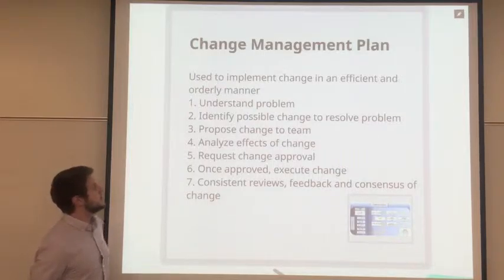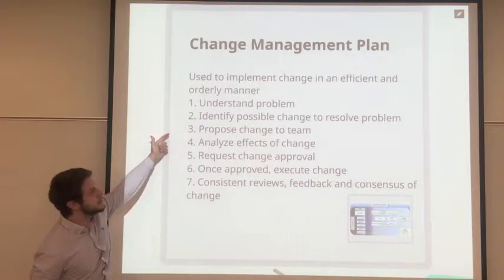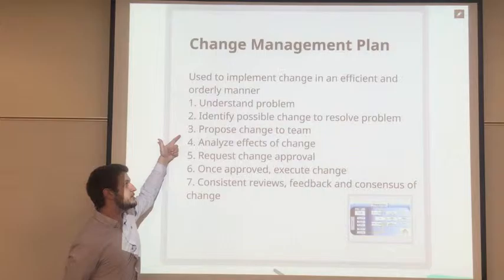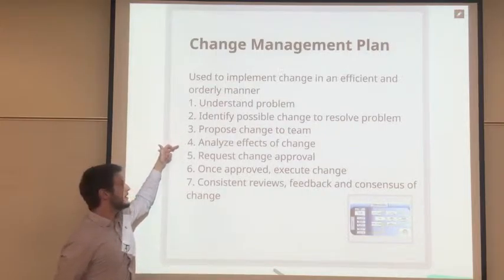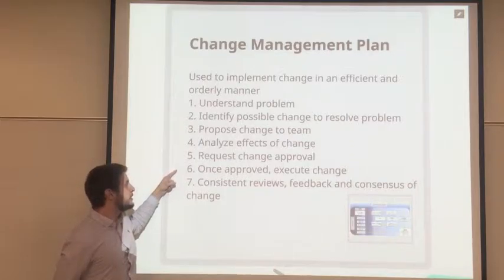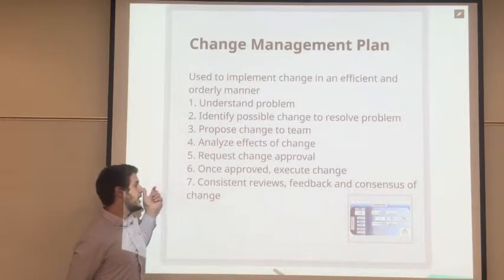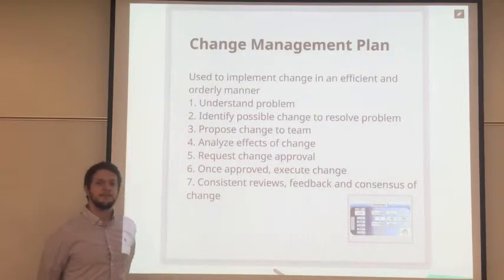The first step is to understand the problem. Then we identify possible change to resolve the problem, propose change to the team, analyze effects of change, request change approval. Once approved, execute change, consistent reviews, feedback, and consensus of change.